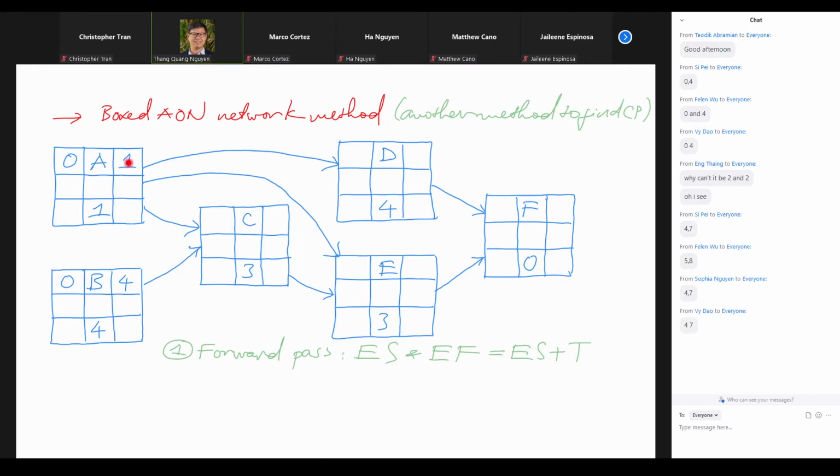And between 1 p.m. and 4 p.m., we have to select 4 p.m. to accommodate that 4. If we choose that point to be 1 p.m., then even though that 1 p.m. is good with that 1 p.m., right? But then that 1 p.m. will be in time conflict with that 4 p.m. We cannot do B and then we cannot do C and then start B, right?